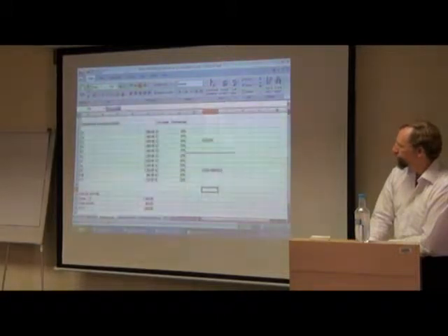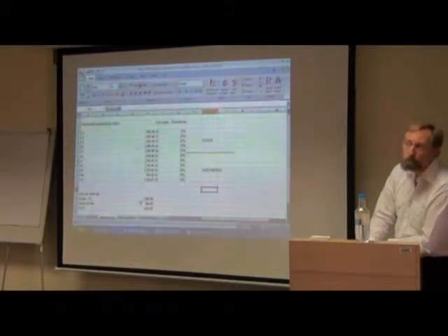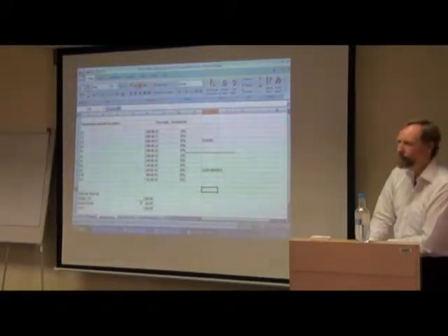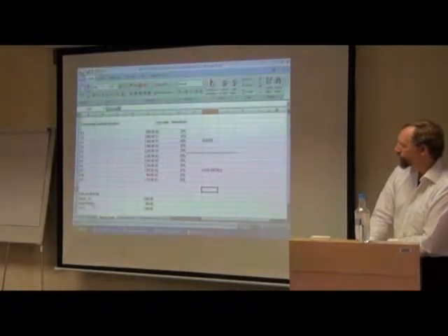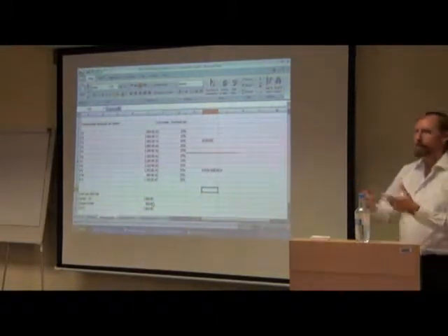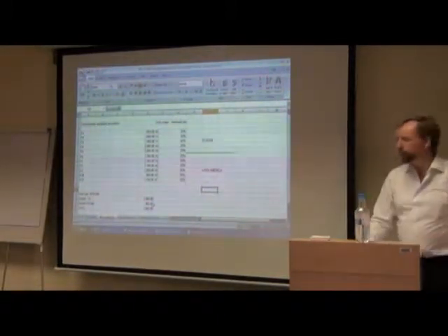For example, under assumptions, in this case we said Europe, Latin America trips cost about 2,000 euro. That is an average, and that's a good start. Intra-European travel between European countries is far less. So if you use that as a base, you can start building up your budget individually.